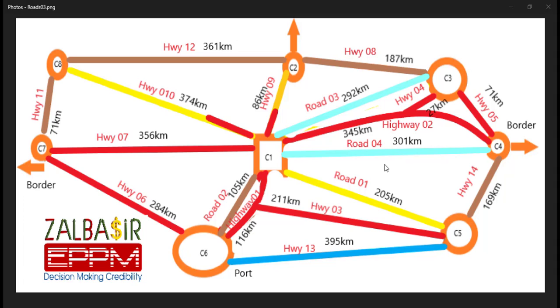Now, this idea, which is applied here to developing countries and highways, applies to any portfolio management thinking. You will have a plan and you need to achieve it, whatever it is, whatever projects you want to do, even schools, clinics, development of any kind of projects within a certain period, and you have a limited budget. You need to think, okay, what to do first? Which one do we do first? Because we have a limited budget and we have to think about prioritizing these projects. So we came up with this simple sketch here.